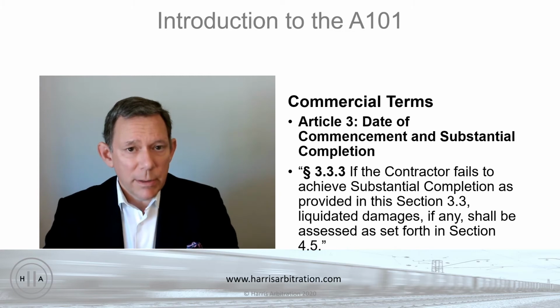And putting a price tag on that can sometimes be difficult because the market fluctuates for tenants and so forth. And so rather than haggle over what the owner's actual damages are, the parties will often agree to liquidated damages in the contract. And so that's what the reference to liquidated damages is here.